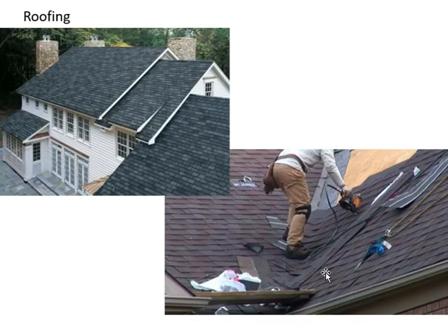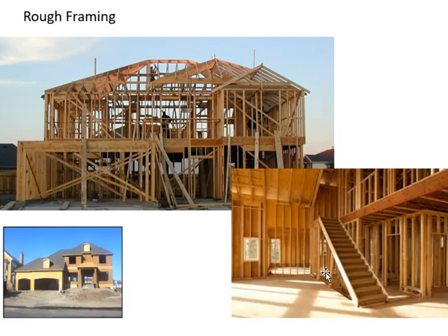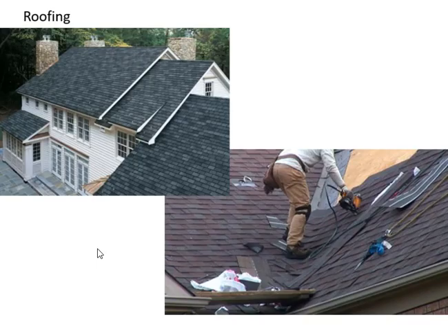The roof goes on. So again, returning to the building envelope, not much is going to happen inside until that building envelope is sealed. If I just turn back here, we do see a picture of a roof. So this is typically how the carpenters will leave it. Rough framing is complete, and there is tar paper on the roof. The carpenters don't put on the roof, but they'll put the tar paper on as a temporary hold for any moisture or snow that will arrive.